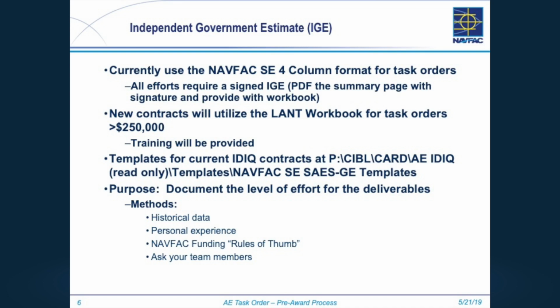Ask other people that have done it. Everybody has a different method. It's like cost estimating. Some of us, Mike might say, well, that's going to take 25 sheets and I would give this many hours per sheet. I don't estimate that way. I estimate based on, it's a design build RFP over $3 million. I would guess 2%, and I'm going to back into a number. So, you know, it's an art, not a science.